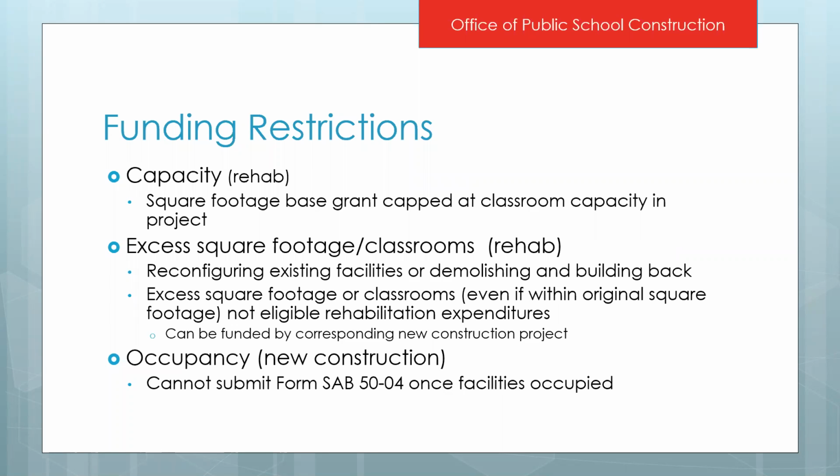You'll see a cap like this happen in projects that are not only rehabilitating classrooms, but a lot of other facilities as well, such as an admin, gym, and a multi-purpose room. And then also a funding restriction may be applied to your project if you are including demolition and replacement of like kind, or if you are reconfiguring existing facilities.